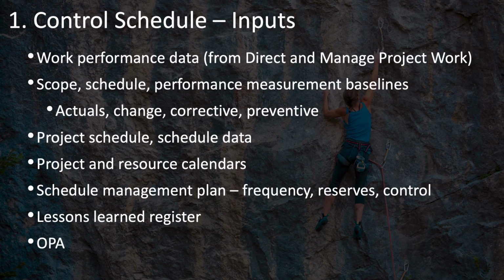The lessons learned register will include lessons learned earlier in the project that can now be applied to how you control the schedule, including the identification of root causes and how well corrective and preventive actions have worked.